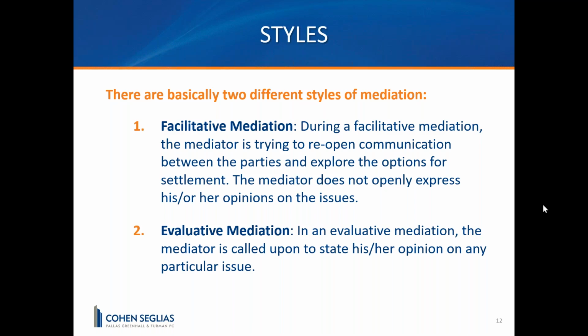Lise, before you go on, with regard to an evaluative mediation, if you've never used that particular mediator before, it's always a good idea to tell them that you don't want him or her to actually put a number on your case. I've had situations where the mediator has walked in and said, I think this case is worth about $100,000. Will you take that? And that was his first step at evaluating the case. That's not what evaluation means.